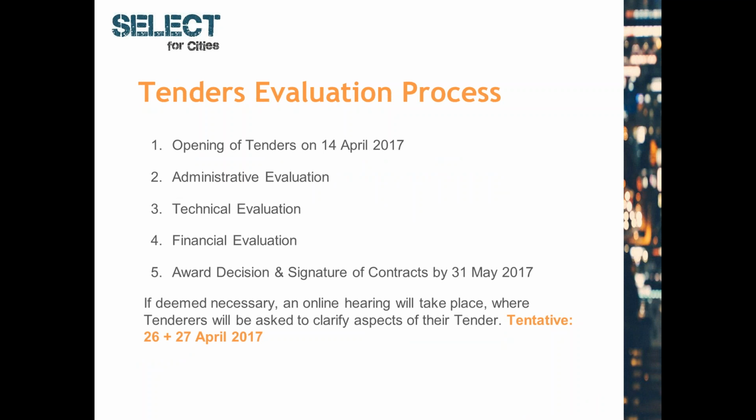Tenders will be evaluated in a non-discriminatory and a transparent manner. First, tenders will be checked on the basis of the compliance with the exclusion, selection, and compliance criteria and with the conditions of the tender. If proven to be compliant, the technical and financial sections will be evaluated. If deemed necessary, an online hearing may take place where you will be asked to clarify your aspects on the technical offer.